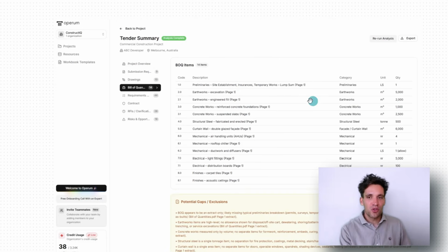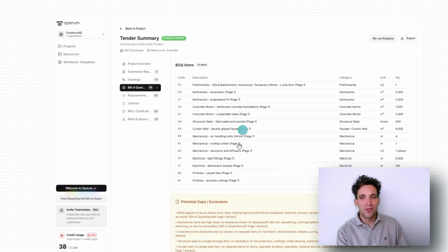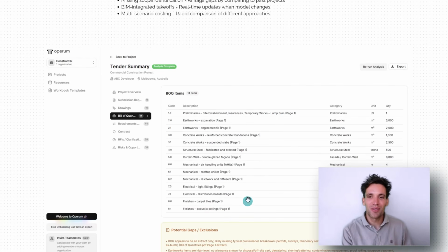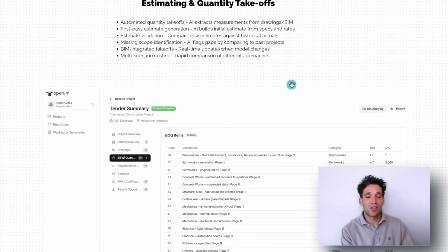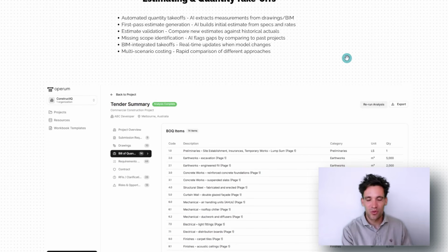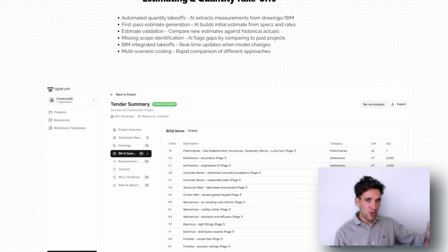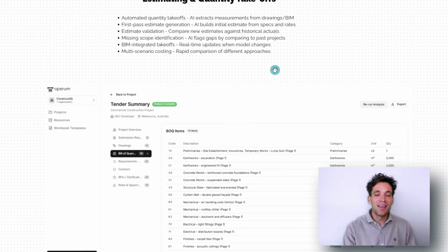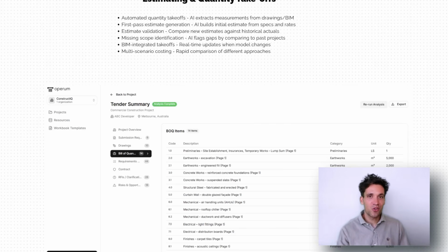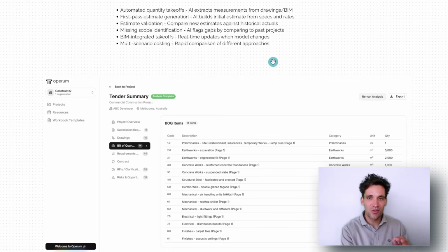The way I focused on this use case is I use AI to extract an indicative bill of quantities and it doesn't claim to be correct. So I qualify it that it's an indicative bill of quantities only, which I think is good for this use case of generating first-pass estimates and budget pricing. Would I get AI to actually prepare an estimate for a lump sum $2 million contract? No, because there's way too much on the line. It's not a good use of AI.